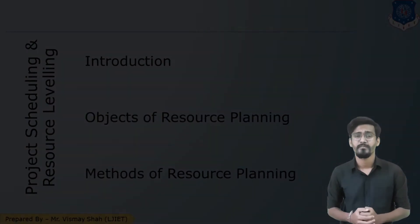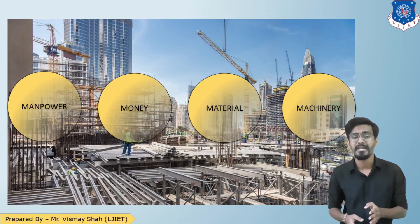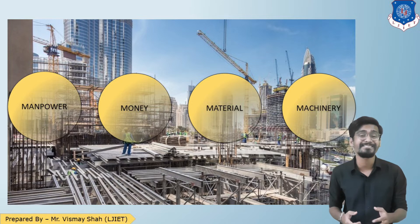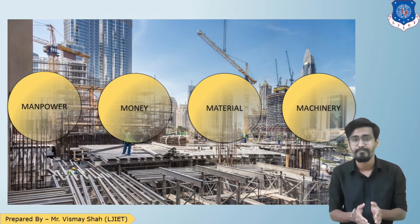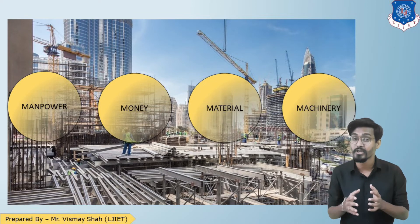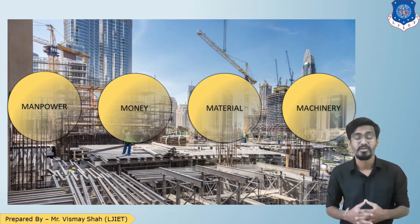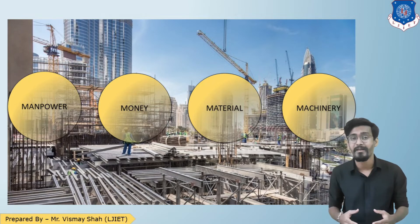To do any construction work we require four kinds of resources: Man, Money, Material, and Machinery. When we were doing analysis by CPM or PERT method, our only focus was on time — we were only using time analysis to determine in what time a project will be completed. But in real-time situations it may happen that the number of resources available is very limited.